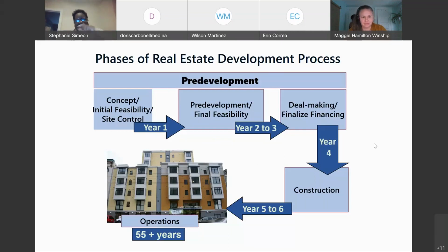Invited to apply. If this is the first time you're hearing that, you can put up more of your frowny face and your thumbs down, because that's how most of it works. And that's what I want to say for those of you who are doing low-income housing tax credit deals and using those kinds of funding structures to move your project forward. You're pretty much doing a really long, expensive letter of intent, because the first time you apply, you're not going to get it.